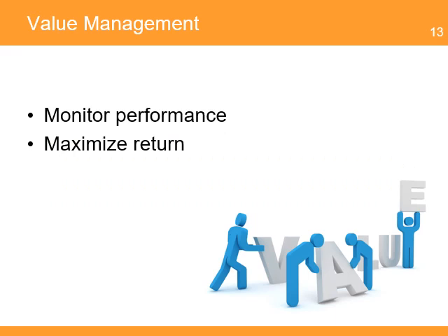In this domain, the portfolio manager monitors the performance of each component of the portfolio, programs and projects, and reports on their progress against expected goals. When needed, the portfolio manager will recommend changes to the portfolio to ensure it delivers the maximum benefit. It may include the reprioritization of resources allocated to projects to reduce cost overruns and risks.